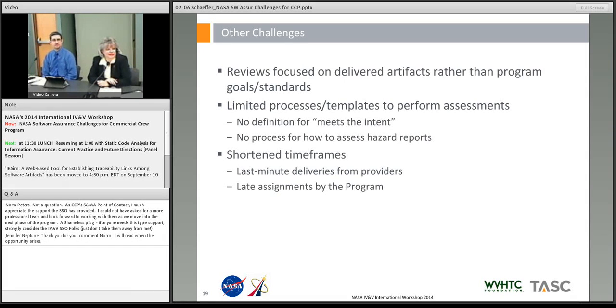I'm glad you brought up the prioritizing of the requirements on that one project. It is actually something, I think it was Task and Bailey's group was in here the other day with their system risk assessment. And sometimes what we do in my field is called a functional risk assessment. We will take the requirements and step through and weight each one, pulling the critical ones out, looking at critical requirements, critical features, and then stepping through and rating each one. So I'm glad you mentioned that because it ties in exactly with where I was going yesterday, but I'm not quite sure if I got there, but you got there today with it, so thank you. Yeah.